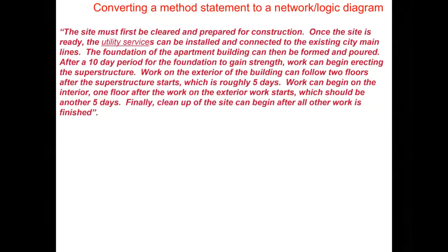So we will do a few small examples to put these ideas into practice. Very often we would start with a method statement, which would be based on our interviews with the people who have to do the production. They will give us a briefing that this is how the project will be undertaken, and then we convert it into a network or a logic diagram.